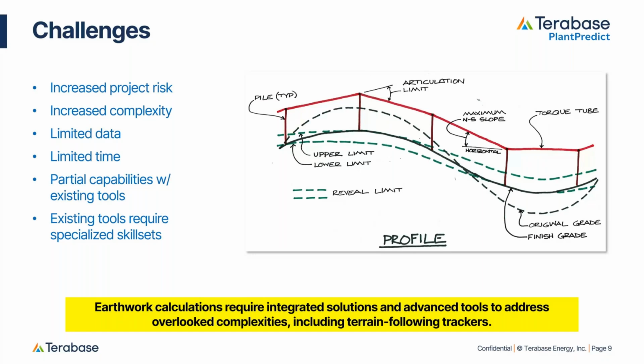Developing the inputs required for a civil engineer to do their work takes time. Layouts take time to put together. Surveys take time to collect. And then once those inputs are available, the earthwork calculations themselves can take days or weeks, and that delays progress.